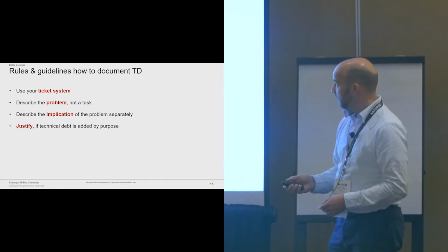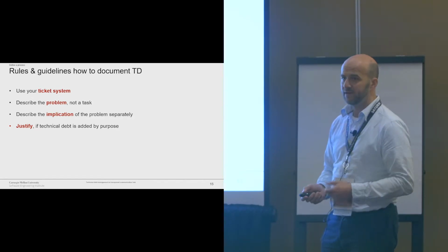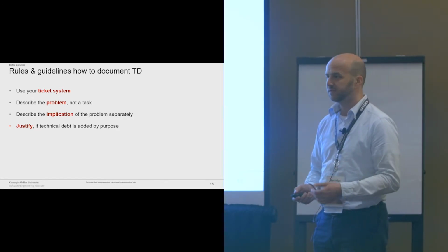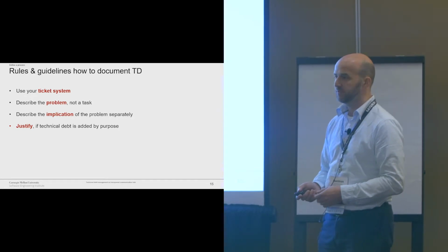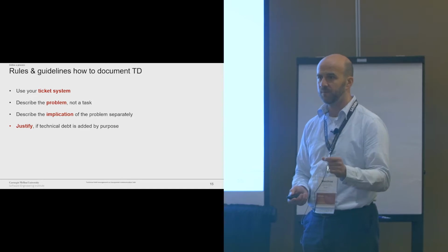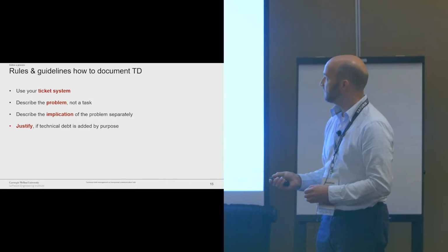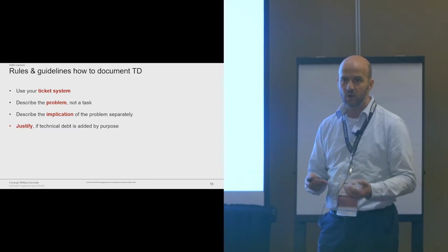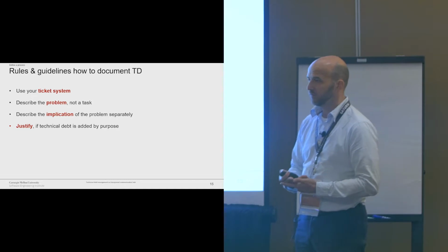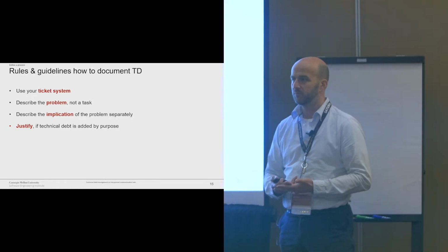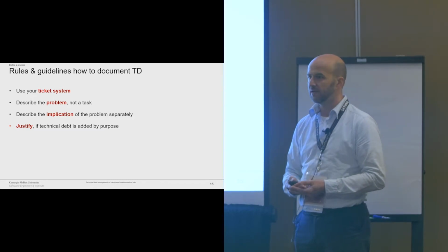But one thing which is very important is that for technical debt we take up today in a project, today or tomorrow, we need to justify it, and this needs to be documented in that system. Justification means the reason why this was done, all the stakeholders involved in this decision, and a repay plan for when they plan to repay it.